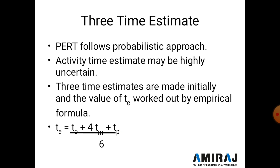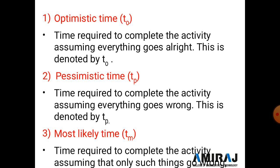Optimistic time (to) is the time required to complete the activity assuming everything goes right. All activities are completed as per schedule. For example, if we target excavation to be completed in three days and it is completed in three days, that time is known as optimistic time — denoted by to.